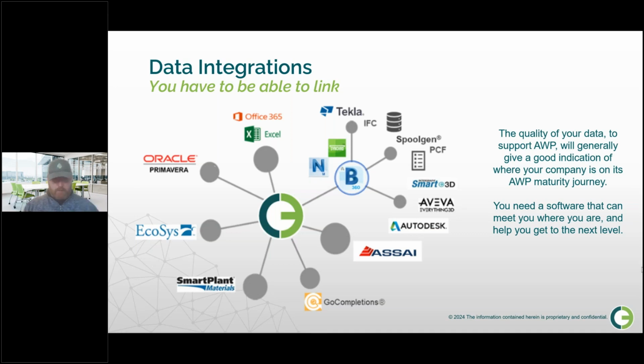But if you do it with O3, because we've integrated with all those other systems, everything's in one place. So I can literally ask the model, okay, show me by color what materials I have. So the stuff that's green, that means it's on site and ready to go. Do I have the drawings? Again, if it's green, it's ready to go. I can build packages meaningfully and intelligently by combining all this data.